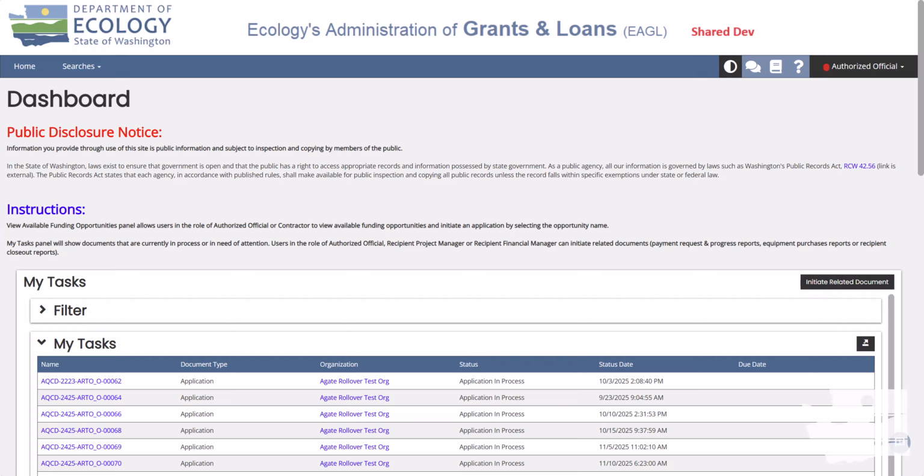Changes that require an amendment include scope of work, deliverables, dates, or objectives of the project, budget, whether for an increase or decrease, funding, whether for an increase or decrease, redistributing costs between budget tasks within a funding distribution that exceed 10% deviation of the total eligible cost, funding distributions, including share percentages, effective/expiration date, whether to shorten or extend, and special terms and conditions or agreement-specific terms and conditions.